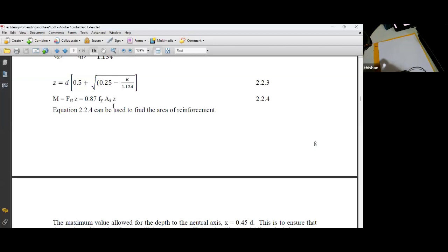In value engineering, if it is an already tendered project, where the contractor comes up with value engineering, and let's say the project value is 5,000 million, the contractor sees the opportunity and says, I'm going to save 1,000 million, or do the project at 80% of this cost.